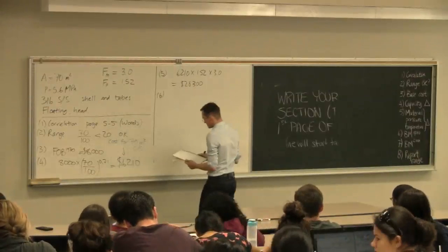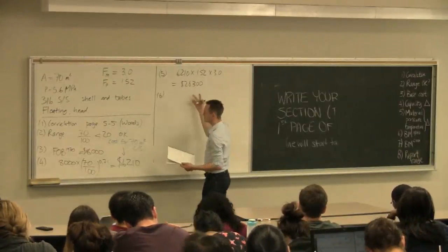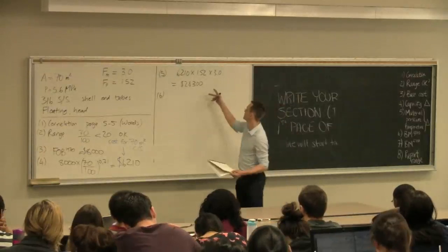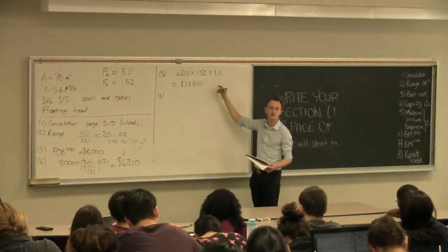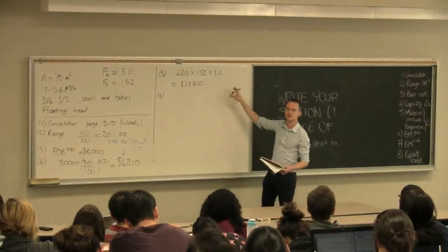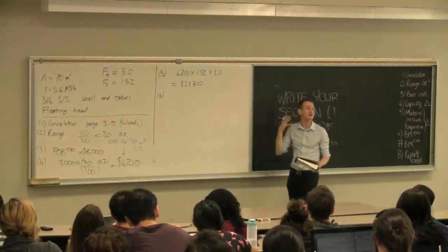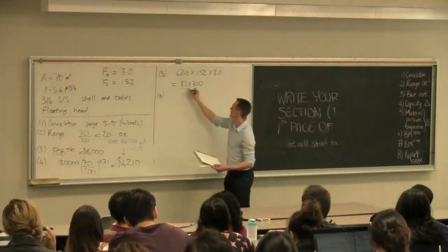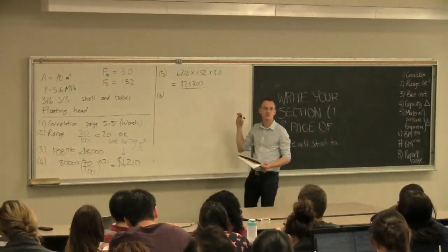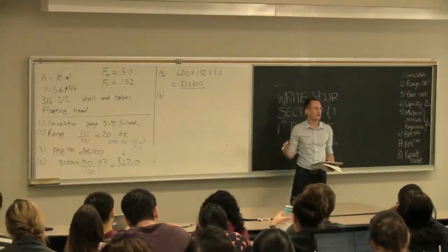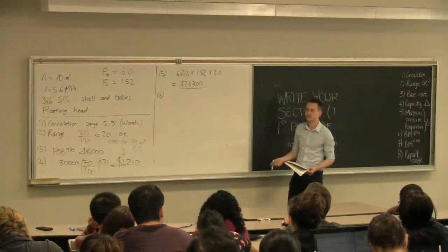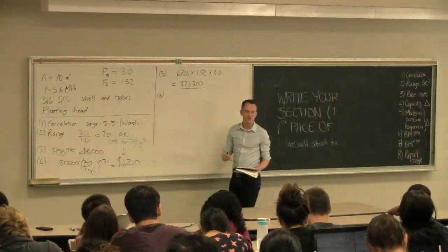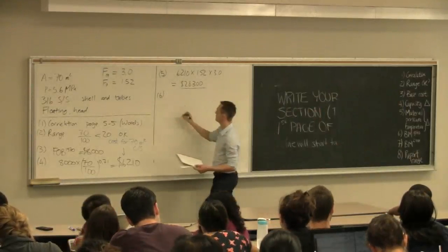And then your next step, 6, would be to say, well, that's my cost over there, but what's my FOB installed cost? Just to take this heat exchanger and adjust it for higher temperature, higher pressure. You may not want to write this down, actually, because this is incorrect. The temptation is to say, this is the price that the vendor is going to charge me, taking the base case exchanger and modifying it for higher pressure operation made from different materials. But that's not installed, inspected, painted, insulated, etc., all those things that go into the FOB price.